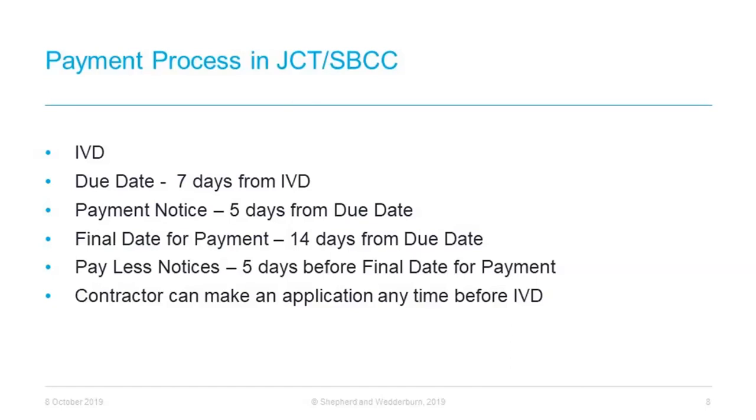It's also worth mentioning that milestone payments are common in JCT contracts, where the contractor will be paid when a certain task or activity is completed. Note that under JCT 2016, the contractor is now permitted to submit applications for payment on a monthly basis, notwithstanding them only becoming contractually entitled to payment for the work stage when the entire work stage has been complete. This is meant to improve cash flow between the employer and the contractor.